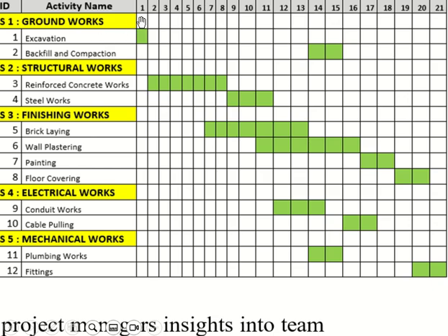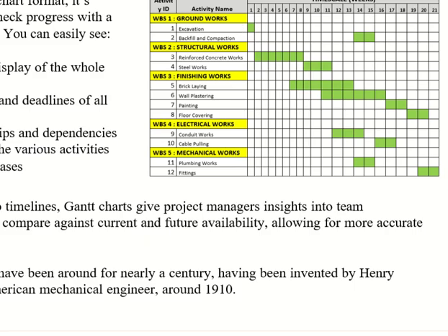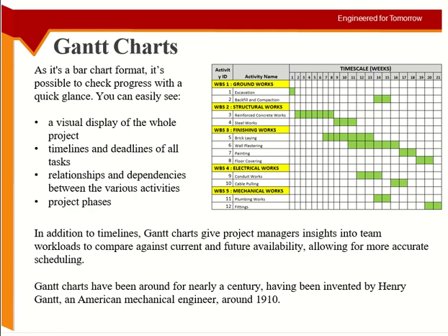You can see the excavation now. Excavation is only in the first week here. So if I have anything which happens after this and I need an excavator over there, I can shift it after the first week. But the first week I need it here. So the Gantt chart can help you look at the availability of the teams. You can assign them properly, and you can do more accurate scheduling, because you know each activity is supposed to start when and end when.